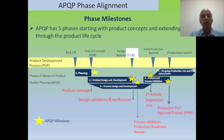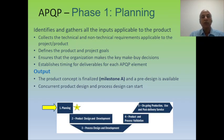After successful completion of each phase, there are several milestones to be achieved. In Phase one — Planning — we gather and identify various inputs applicable to the product, like technical data and non-technical requirements. We define the product and project goals, ensure the organization makes key decisions that will influence the market, and establish timing for deliverables of each APQP element. During this phase, we decide the timing plan for different phases.